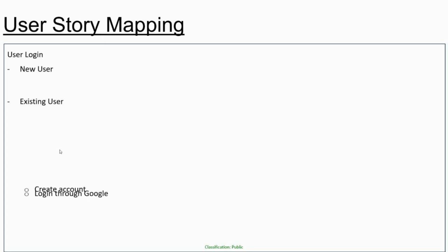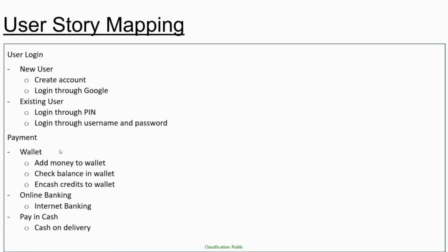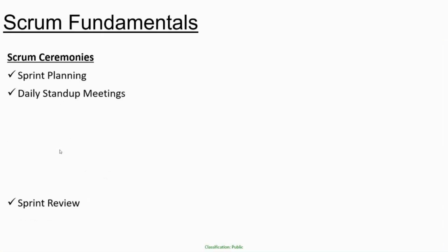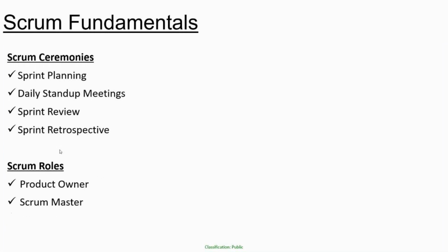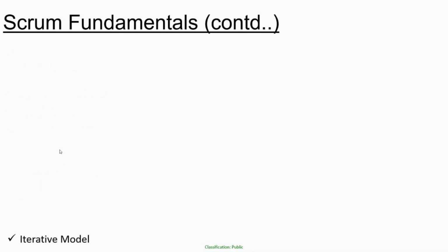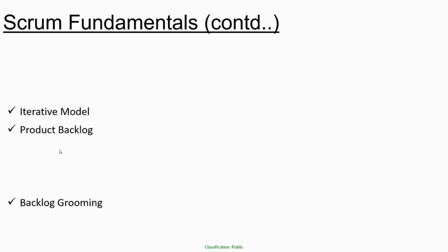Now what happens is, let's say that at the initial part of your project you had a product backlog in place, where you placed whatever 10 or 15 or 20 user stories. Then in between the project, maybe some new features have come up which have got a higher priority. Then there were other existing user stories which had to be removed altogether. So you're deprioritizing user stories. This sort of thing happens. Then you need to make sure that your backlog is revised at regular intervals, maybe once in 2 weeks or once in a month.